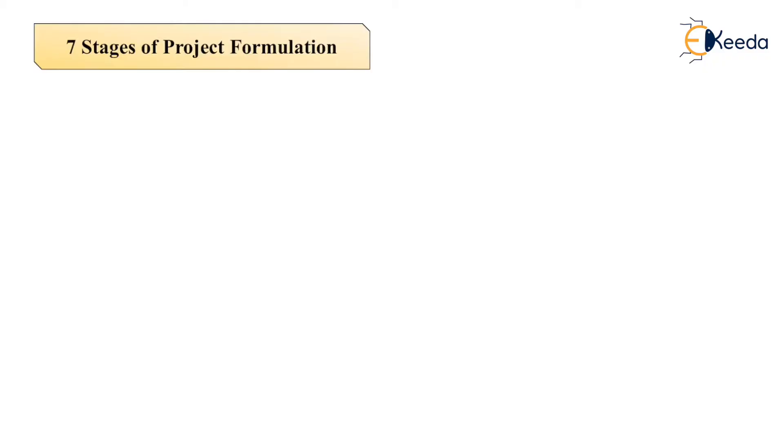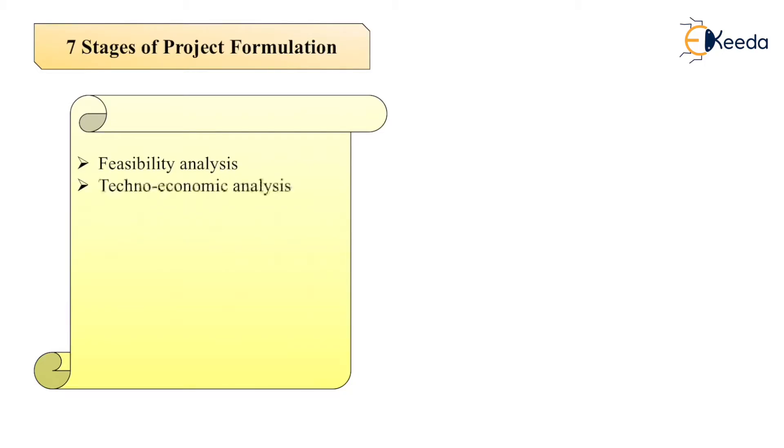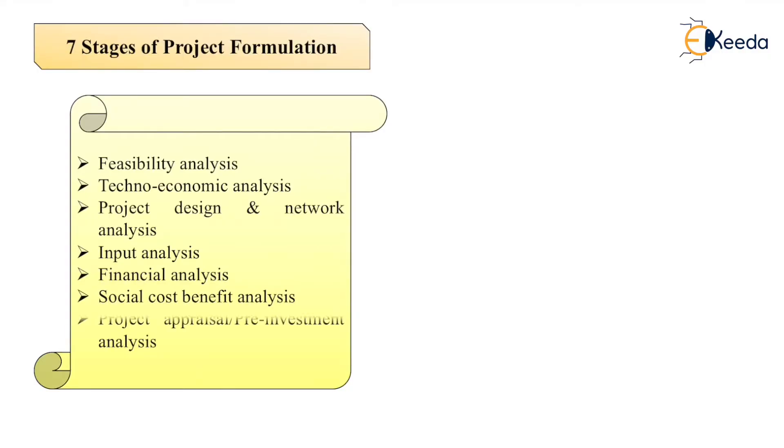Now there are seven stages involved in project formulation. First is feasibility analysis, then techno-economic analysis, then we go for project design and network analysis, then input analysis, financial analysis, social cost-benefit analysis, and lastly project appraisal or pre-investment analysis.